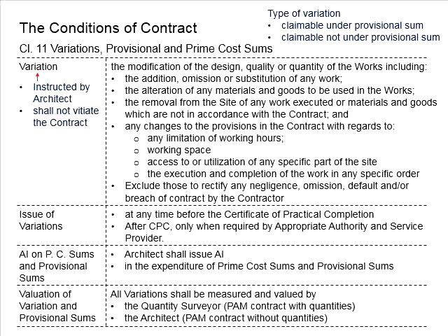However, due to some unforeseen circumstances, there may be some constraint, and such constraint is not due to the problem of the contractor. It is not due to the ignorance of the contractor or incompetency of the contractor, which is inevitable, not reasonably predicted or foreseen during the stage of the planning. As a result, the relevant costs incurred should theoretically not be imposed onto the contractor.